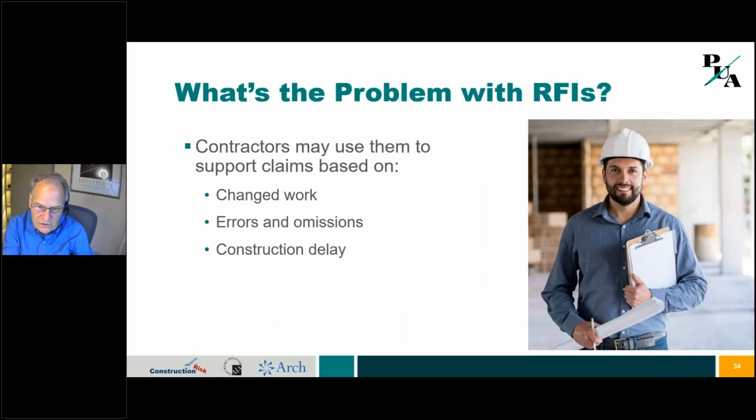Okay, request for information. What's the problem with RFIs? So, RFIs are a very good thing. The contractor has a question, they're going to ask a request for information, and your duty is to respond to that RFI diligently and timely. You'll find a lot of contracts have a time limit saying you've got to respond to an RFI in 4 days. I normally strike that out and say, 4 days or such other time as is reasonable, because if you commit to a 4-day time period, but the RFI is going to require a serious amount of research to respond to, you're still going to have a claim against you by the contractor saying you delayed his work, even though you couldn't logically have responded within the standard of care to that 4-day requirement. So you need to pay attention to that contract language.